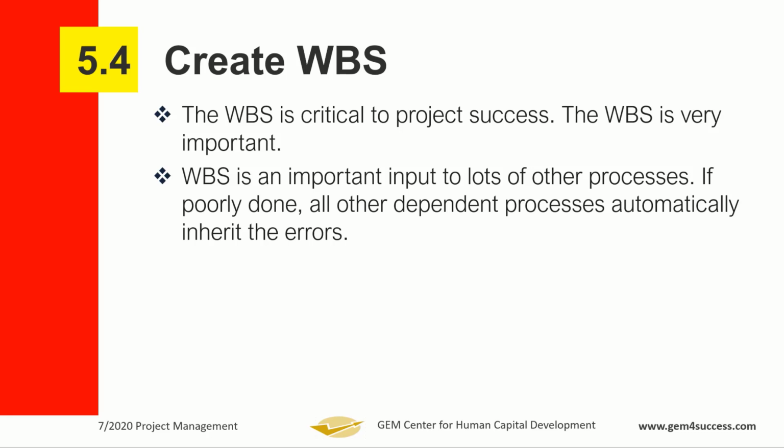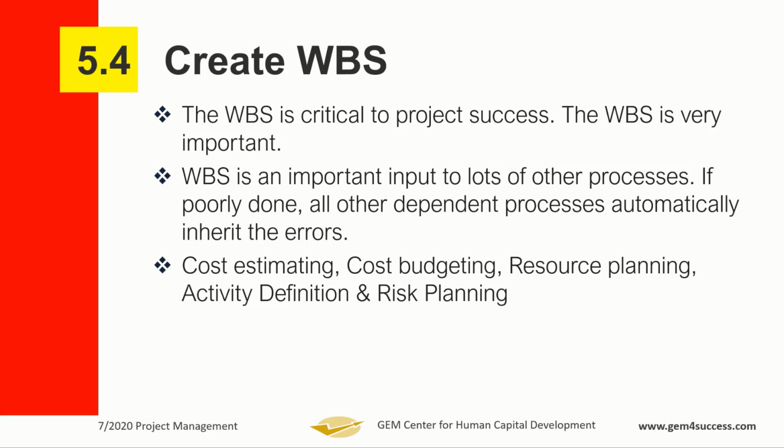It just cascades down. So your cost estimating, your cost budgeting, your resource planning, activity definition, risk planning, even communications planning, and many more, procurement. All of these things are picking directly from your WBS. Errors in the WBS would automatically reflect in those areas.